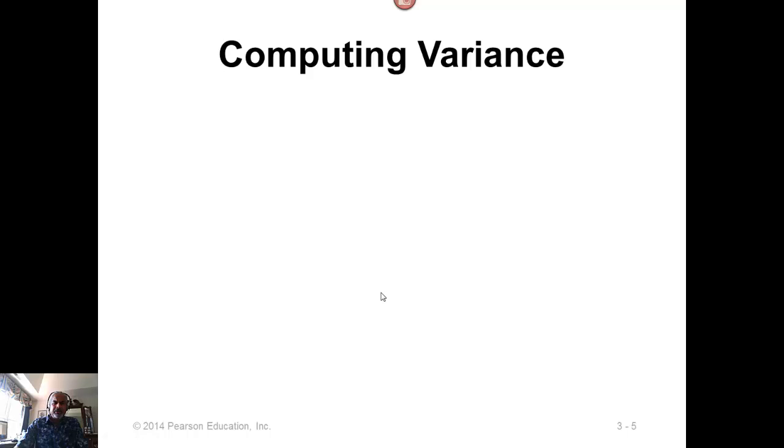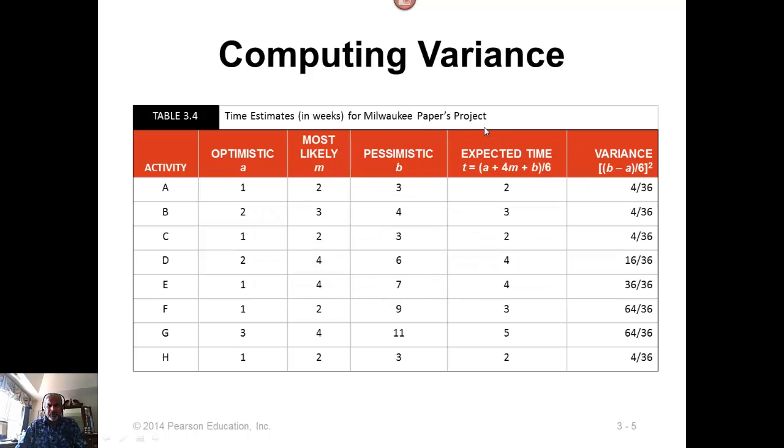Let's look at an example. This is the same example, the Milwaukee paper project. We have activities going from a through h, and let's assume that these are the three optimistic, most likely, and pessimistic estimates that we have come up with. Then, using this formula, we can compute the expected time, and using this formula, we compute the variance. Notice here that I'm not dividing the 36 into 4, because that increases the number of divisions, increases the amount of computation, and also reduces accuracy. I'll talk more about it in a little bit.